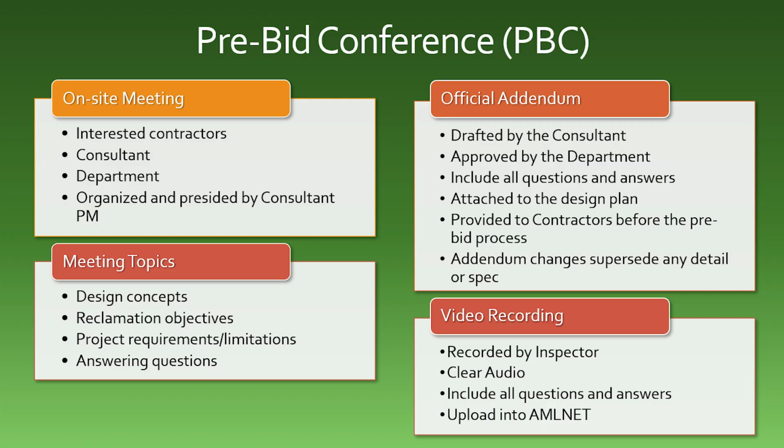to proceed. The pre-bid conference is a required on-site meeting with all potential contractors interested in bidding on and completing the reclamation project, the consultant which designed the project, and all department members related to the project. Landowners need to be invited to the meeting but are not required to attend. This meeting will be organized and presided over by the consultant's project manager, who is responsible for explaining the design concepts, reclamation plan objectives, conveying all project requirements and/or limitations, and answering any questions regarding the project.